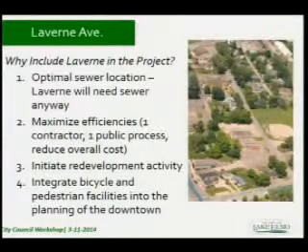Jack can get into some of those reasons, more of the specifics of that. But what we found is that a lot of those buildings on the east side of Lake Elmo Avenue are actually served to the rear of their facilities. So aligning that sewer up Laverne is key in that facet.